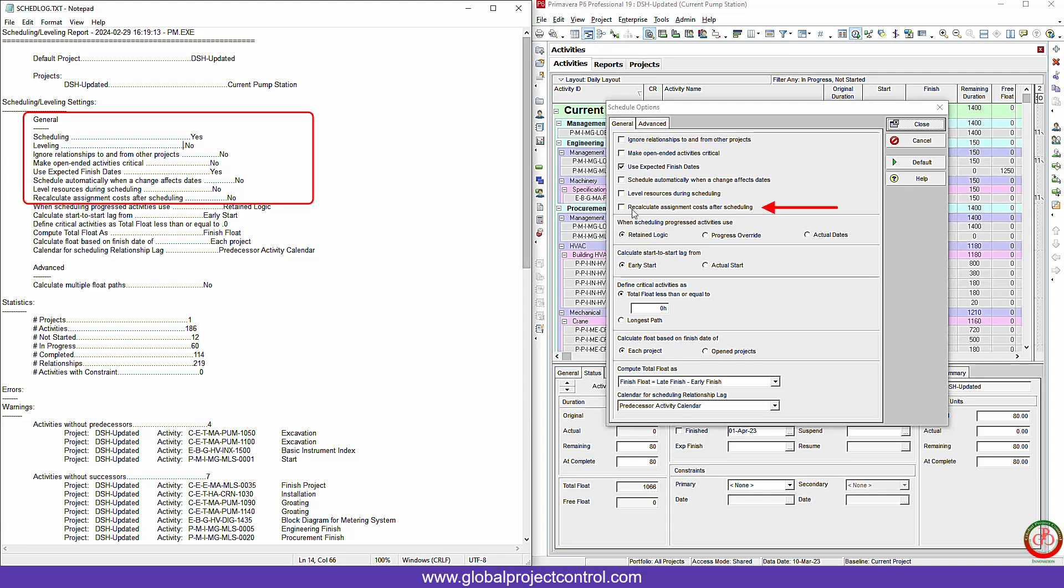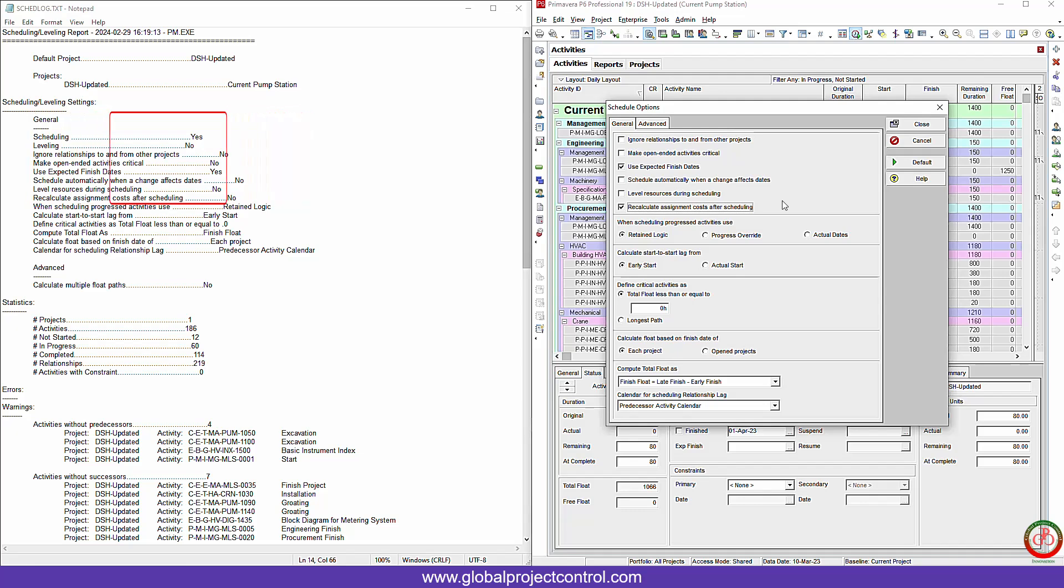And the rest of information. One of them is very important. If you uncheck it, please check it: recalculate assignment cost after scheduling. If you have the cost loaded program, maybe you need to recalculate after each update for the progress, maybe for any cost of resource changes. Then after each schedule update, you will see the result will be updated for the cost too.